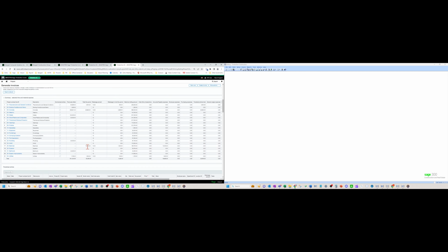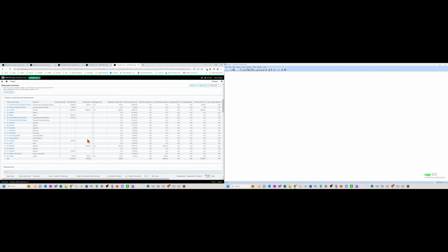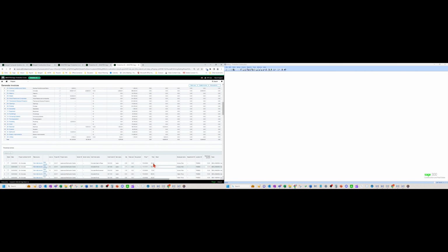Okay. So number 1, the summarization of these line items, this checkbox here tells me I've turned that on. Okay. So instead of coming down here and billing these one by one and adjusting these, if I want to adjust in lump sum that I only want to bill $4,000 for my labor or this pre-construction and general conditions line, I can just type it here and it takes care of adjusting every single one of these line items.